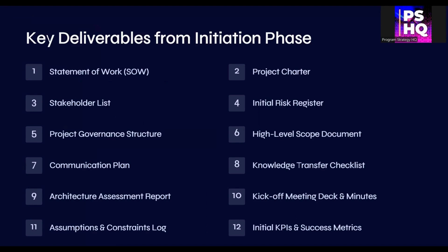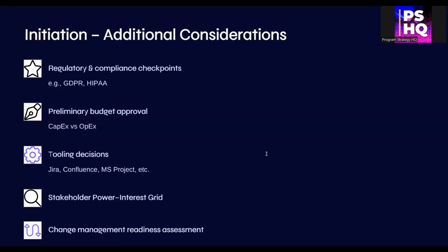A few areas are often missed. Compliance. Are you considering regulations like GDPR or HIPAA? Budget. Do you have CapEx versus OpEx clarity? Tooling. Have you selected your tools like Jira or SPM? Stakeholder engagement. Have you mapped influence and interests of the stakeholders? And also change readiness. Is the organization even ready for this transformation? This wraps up the initiation phase.